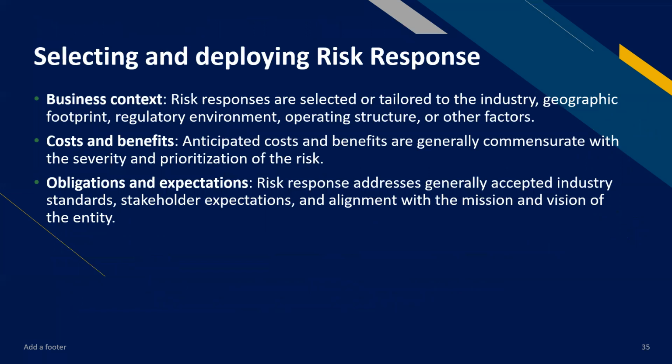Now, when you select and deploy the risk response, of course, you have to take note of the following. Number one is the business context. So the response should be appropriate to the industry, geography, regulatory environment, operating structure, and other factors. Siyempre, within the confines of what you can control and how your actions can interact with the environment of the entity.